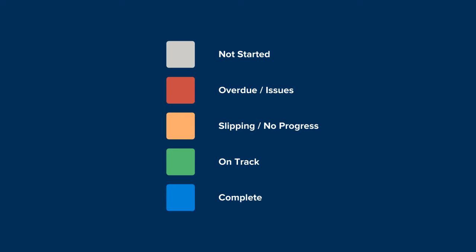Grey represents tasks that have not yet started. Blue represents tasks that are complete. And the traffic light system of red, amber, and green can be used for tasks that have slipped behind, are in danger of slipping, or are on track.